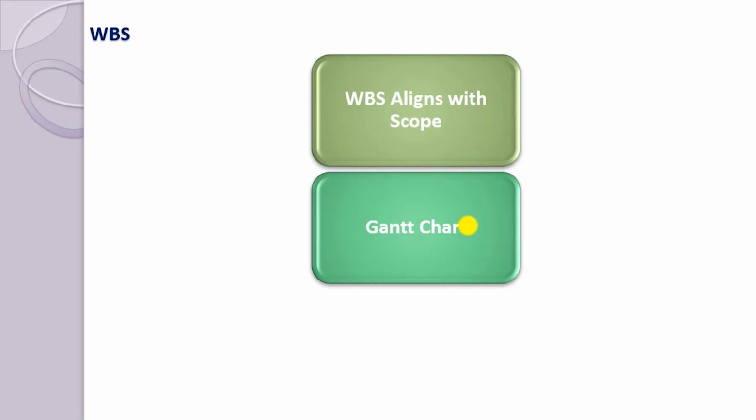Traditional project management techniques would have you assign each deliverable to the team member who will be working on it, then perform what's called resource leveling. This is the process by which you identify that some people in your team have a daily workload of 200%, whereas others are operating at 20% of capacity. And this is the idea. Once you have identified these discrepancies, you can reallocate the tasks.